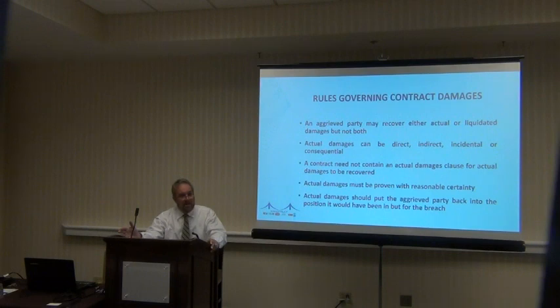So the reason liquidated damages clauses in construction are so generally popular and liked is because they make it pretty darn black and white. You're late, it's $1. 2 days late, $2. 3 days late, $3. It's just math. You don't have to prove up anything. You just get out the calculator and do the math. So we don't have to go to trial. We don't usually even have to establish a claim.